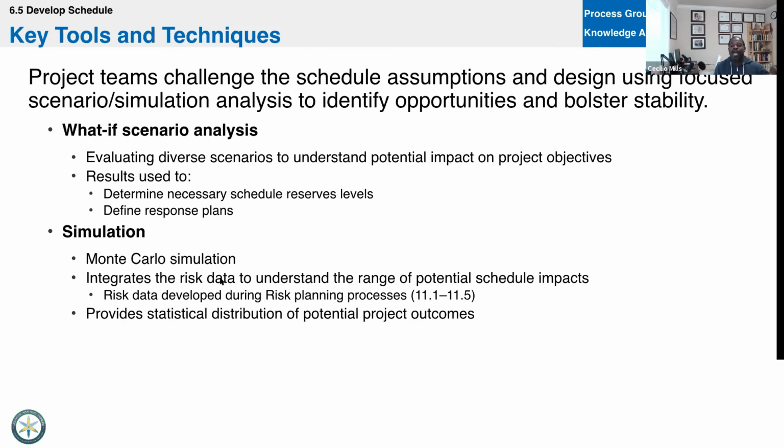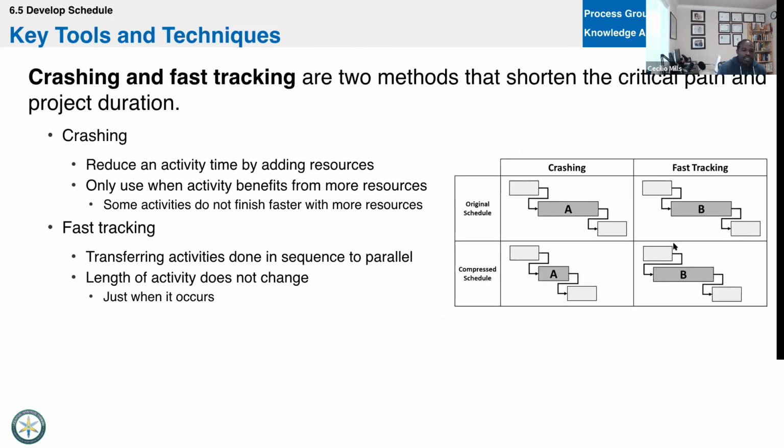Now we haven't talked about the beta or PERT yet, so you haven't seen the full standard deviation set, but that's where this may come in, and you'll run simulations to get schedules that come within 1, 2, 3 standard deviations. Then we'll use that to provide levels of confidence to our folks. I'm going to give you a 68% level of confidence schedule, a 95 and a 99. That's the idea there. So that's the simulation.